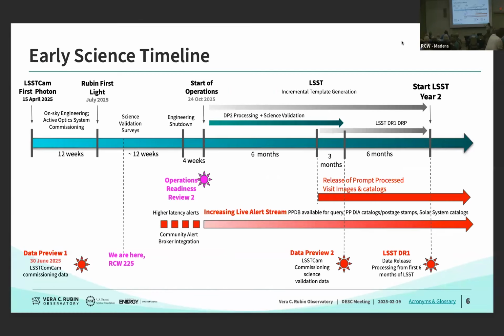We'll have this engineering shutdown for 4 weeks before we hand over to operations. Sometime during commissioning, we want to start sending alerts out to community brokers. After we start operations, sometime after that, we will start the LSST.